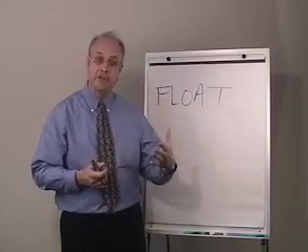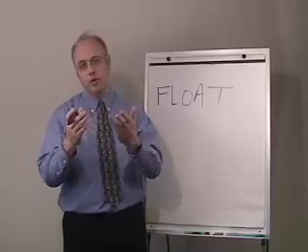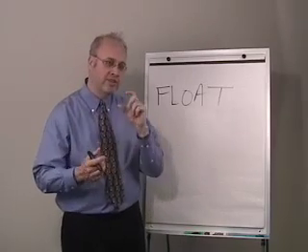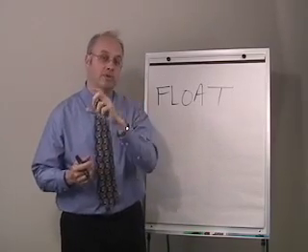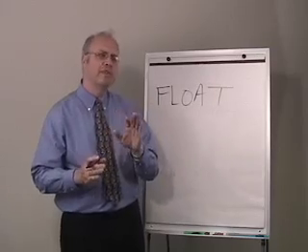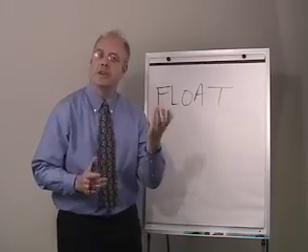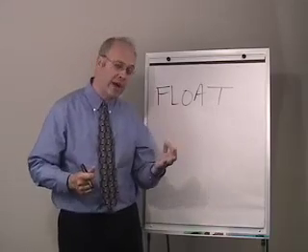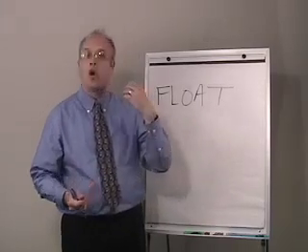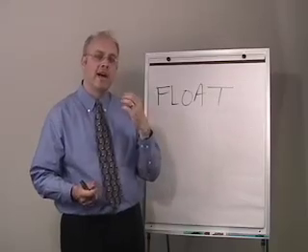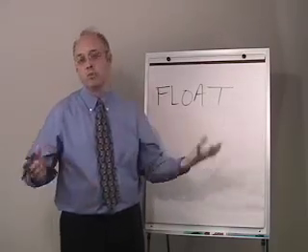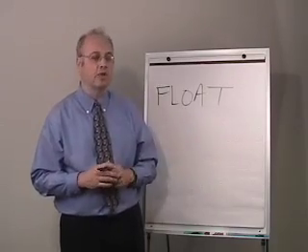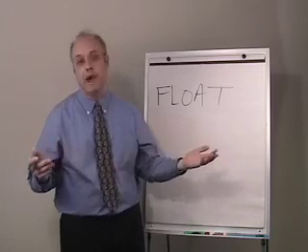Now, many contracts now, and frankly, your contract, should say exactly who owns the float. The simplest contract provision simply restates the norm or the industry standard, which is that the contract owns the float and all parties to the contract have float available to them on a more or less first come, first served basis or as needed basis until it expires.